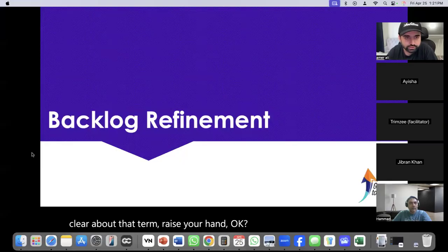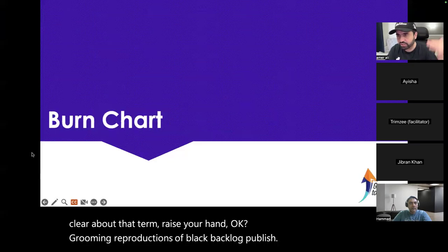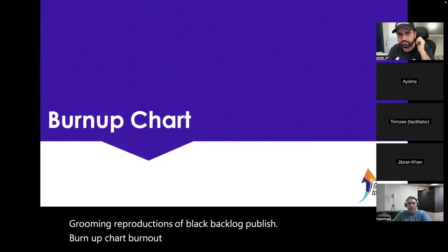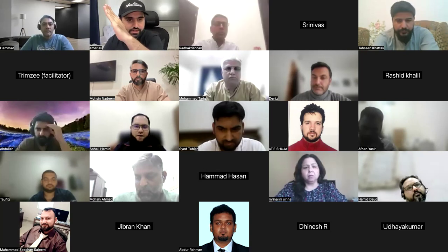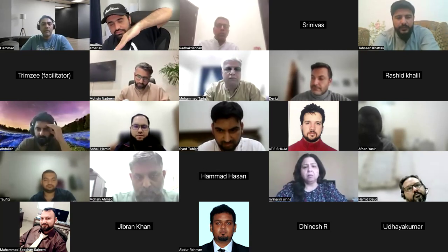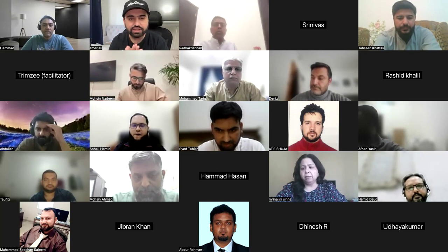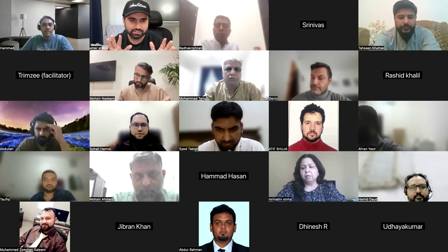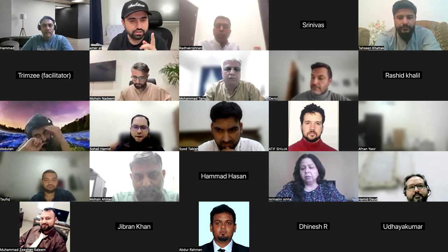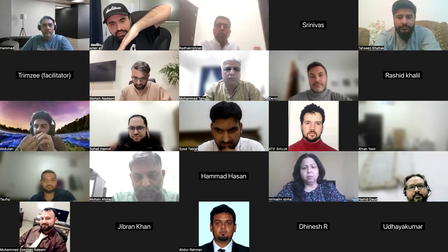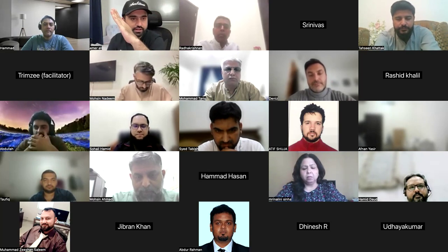Grooming, reprioritization of the backlog. Burn up chart, burn down chart, we discussed them. How much work remaining, how much work is done. Burn up is how much work is done. Burn down is how much work is remaining. Please, if anyone is not clear, do ask me. Burn down, remaining. Burn up, done.